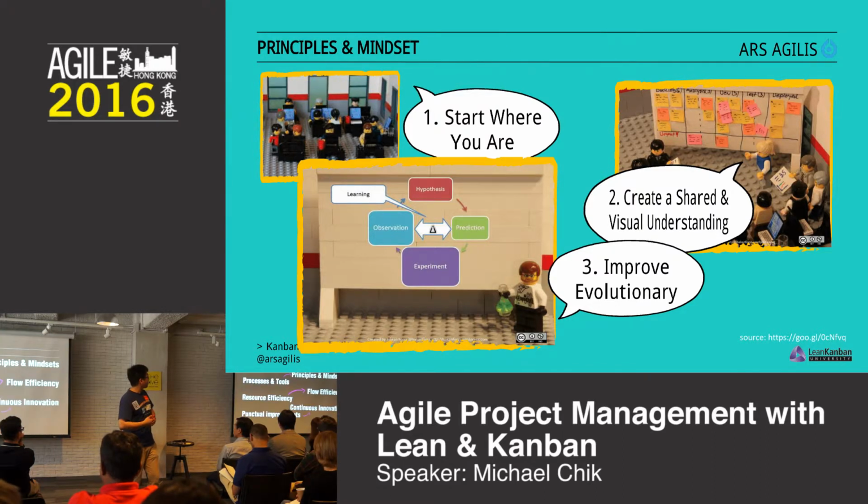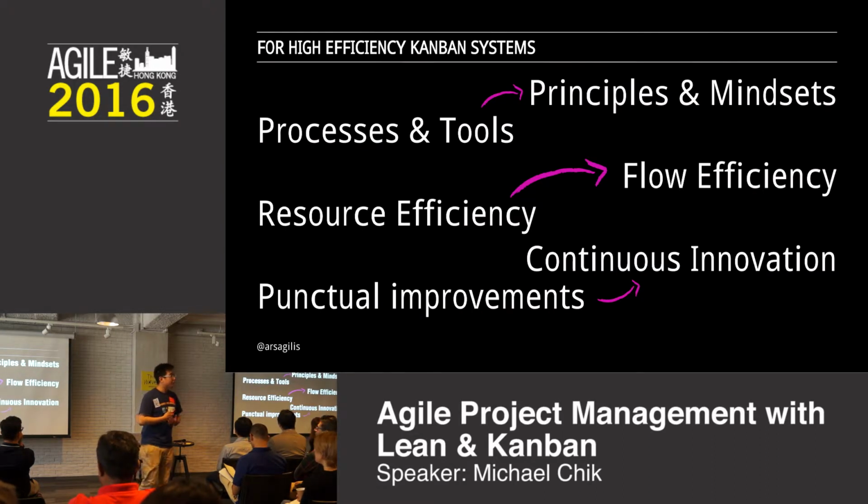Processes, principles, and mindset. I'm going to introduce you to one very useful tool that we use to improve flow efficiency, which is another way to say to make things much faster. Number one, you have to introduce work in progress limits. Just by introducing work in progress limits, whenever I do it, I make things go much faster, the minimum that I had was 100% faster. It goes twice as fast. Lead time. I'll talk about metrics later.